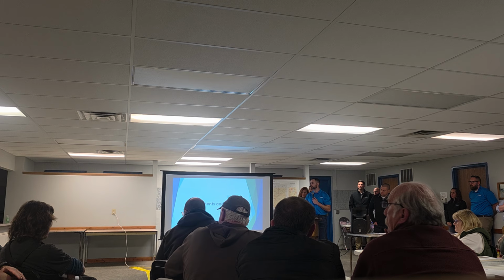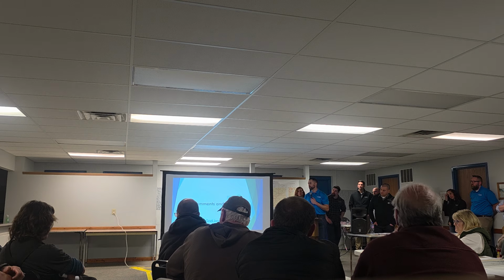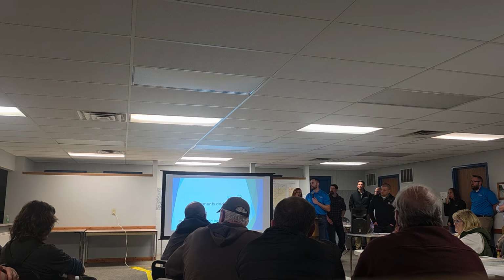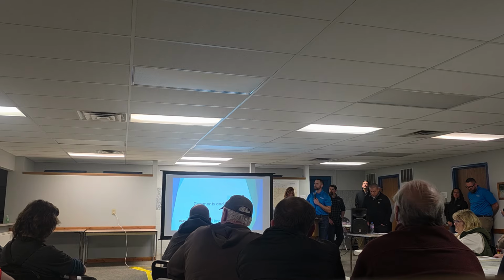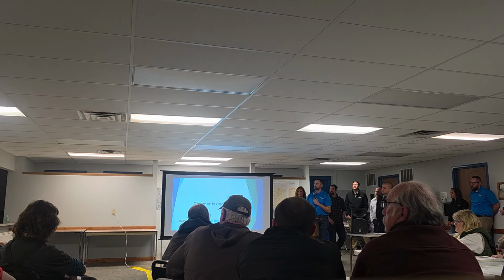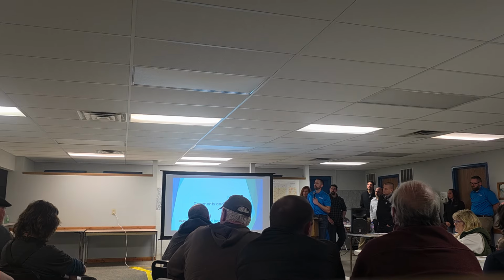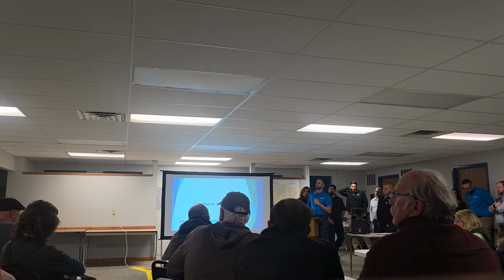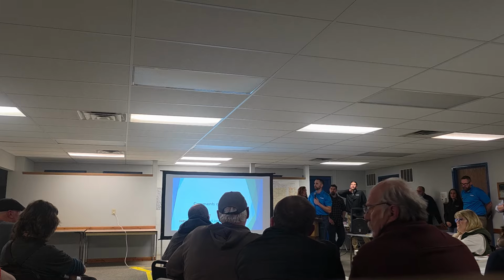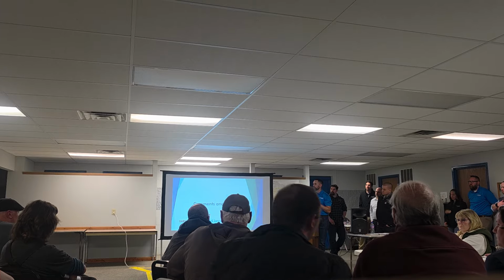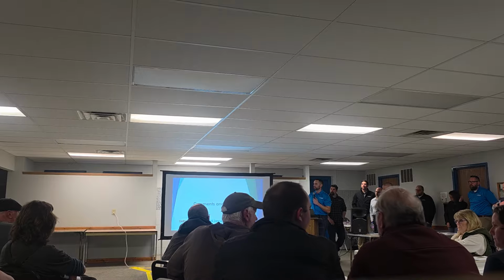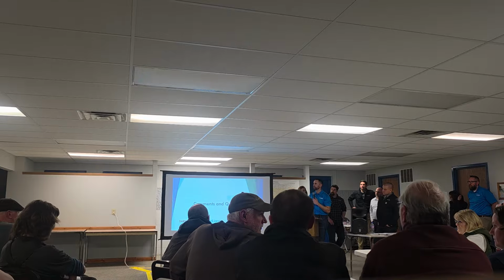Is that a third party that views that and says, yes, this is damaged by you guys, or is it the contractor says, yeah, that wasn't us? Or how does that get regulated? Is there a township board or our patrolman who gets to deem if something is damaged, or is it a he said, she said type thing? Yeah, what I have seen in the past is that there'll be a survey of the road condition before construction, so a baseline, and then if there's damage from that point, that's right. You got it.